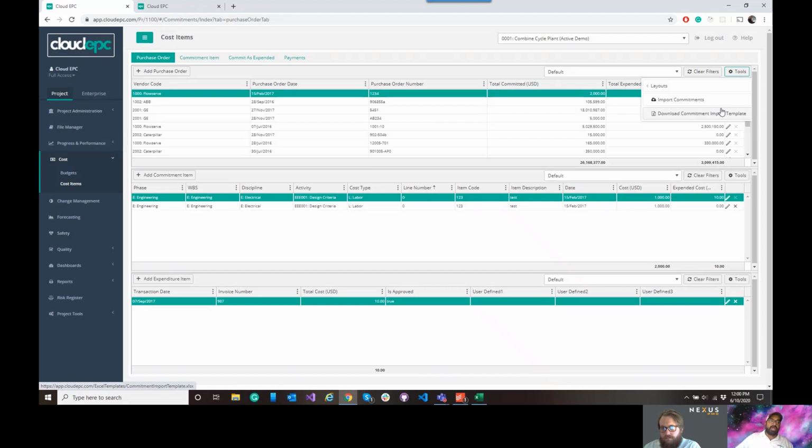We've also done integrations via what I'll call the CSV handoff process, where an enterprise client maybe wants to run every night or every 12 hours, let's say, an extract out of their accounting system in, quite frankly, the same format as our Excel file. We can load that onto a secure FTP or some sort of methodology through email, and we can process those files every night. And so we can be essentially out of sync 24 hours with your accounting system.